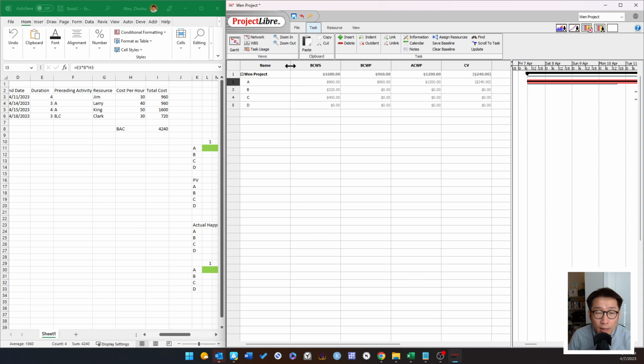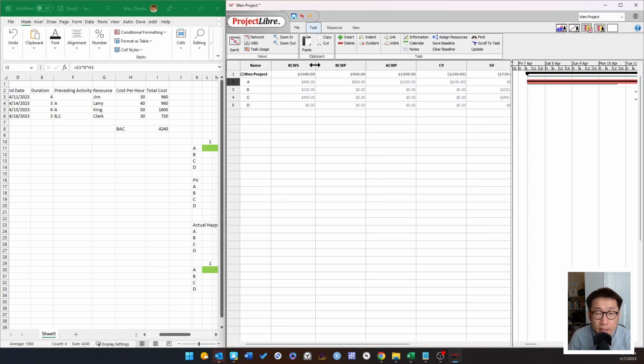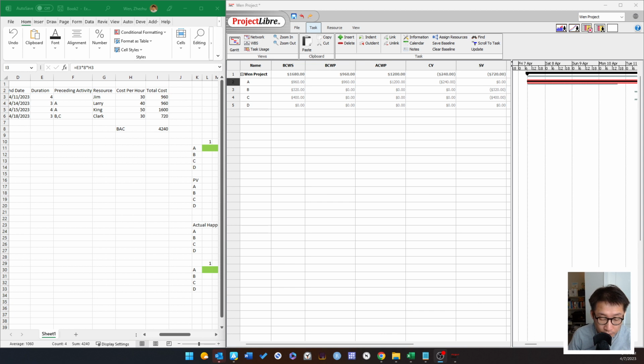Okay, so you have activity name here. This is a BCWS. So what is BCWS? BCWS is the older earned value terminology. It is the acronym for budgeted cost for work scheduled. I know this is very long and lengthy. That's the reason why people later changed this into PV, very short and simple. Budgeted cost for work scheduled. Okay, so if you look at this video recording, I have that information indicated here.